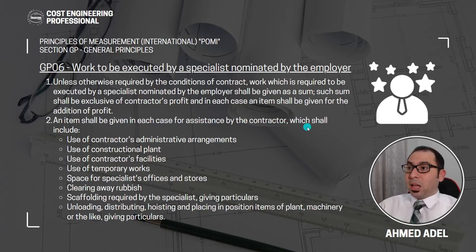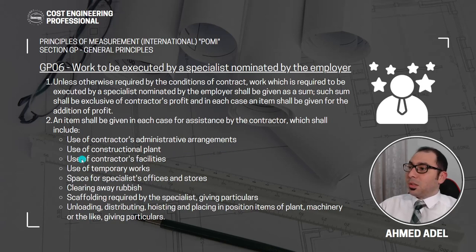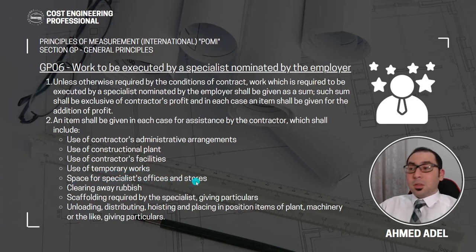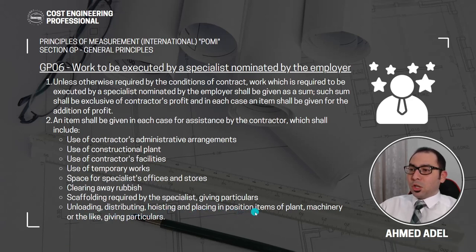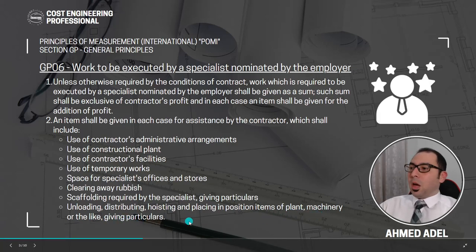What assistance is required by the contractor? It includes: use of contractor's administrative arrangements, use of constructional plant, use of contractor's facilities, use of temporary works, space for specialist's office and stores, clearing away rubbish, scaffolding required by the specialist, giving particulars, unloading, distributing, hoisting and placing in position items of plant, machinery or the like.